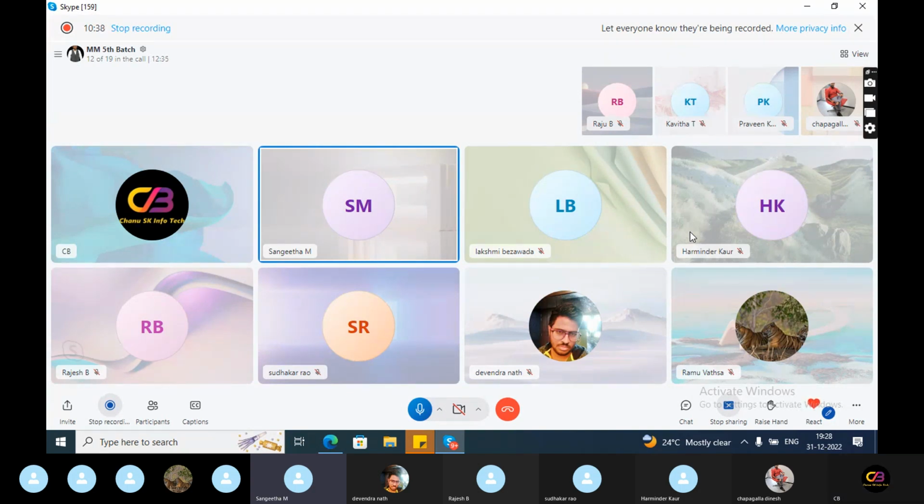There are 6 phases in Activate methodology: discover, prepare, explore, realize, deploy, and run. We will be involved in all the phases as a functional consultant. Agile methodology means it is sprint planning based. Each sprint completion takes from 2 to 4 weeks.